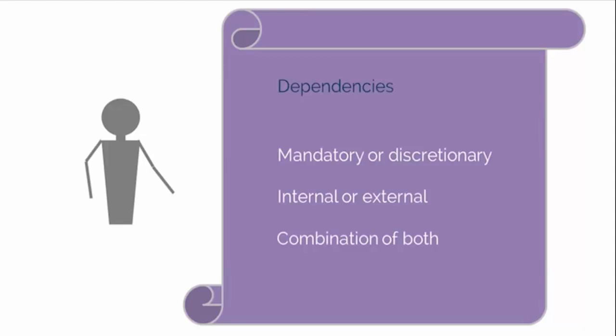tested. Internal dependencies involve a precedence relationship between project activities and are generally inside the project team's control. For example, you know that drywalling a wall should be complete before the painting can start. Note that this is also an example of a mandatory dependency. It's important that the project management team determines which dependencies are internal during the process of sequencing the activities.